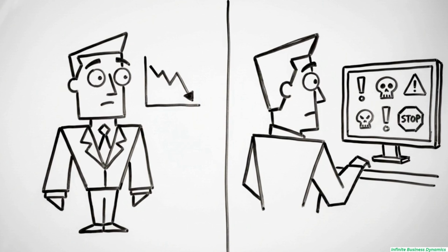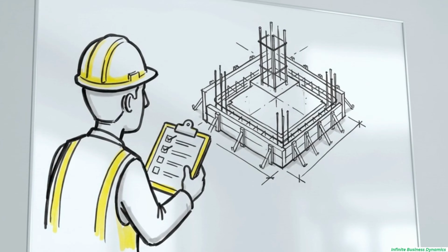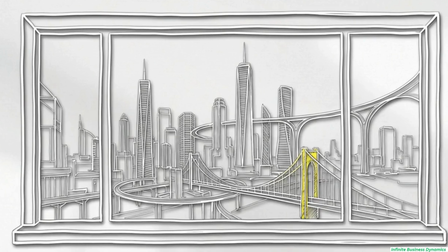If leadership looks only at the raw dollars missing, they risk ignoring systemic failures in small projects while overreacting to normal fluctuations in large ones. Absolute variance works for local, daily management, but it is structurally insufficient for C-suite leaders who must compare diverse, multi-million-dollar portfolios on an even playing field.